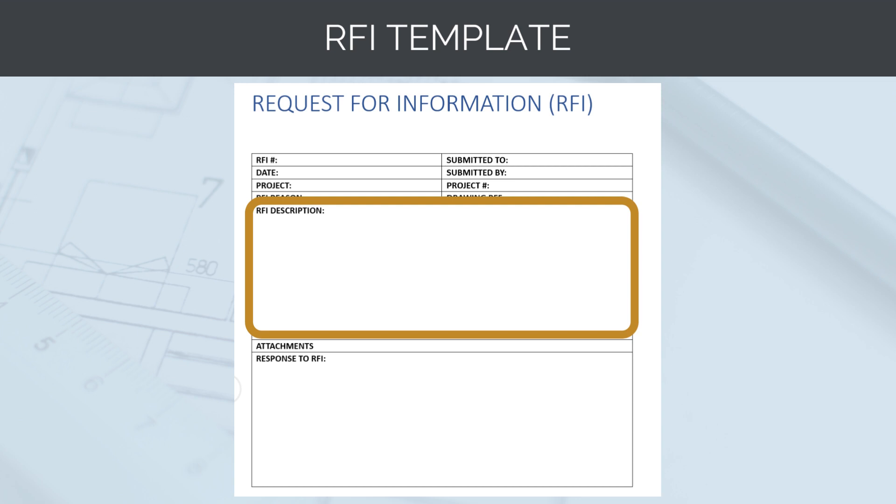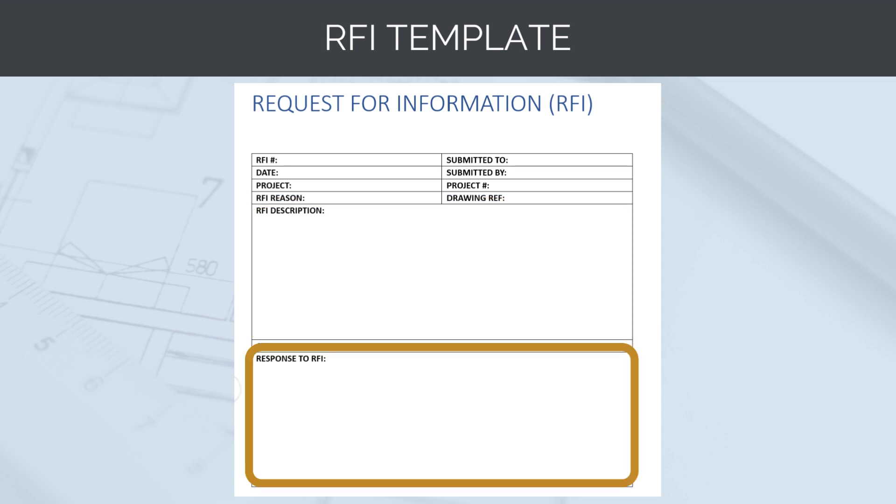If we are proposing a value engineering change to the design team, we need to make sure we have done our background research and be confident that we will be allowed to proceed with the change before submitting the RFI. The design team will then respond to our query and, if we are happy with it, implement the change in the field.